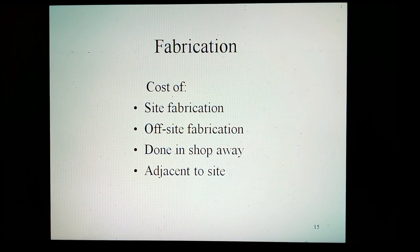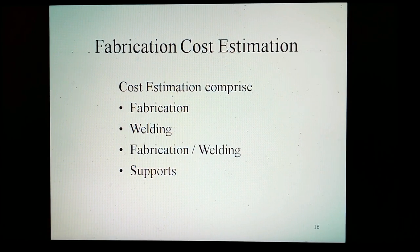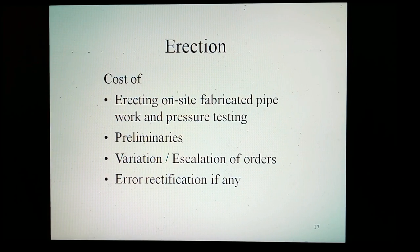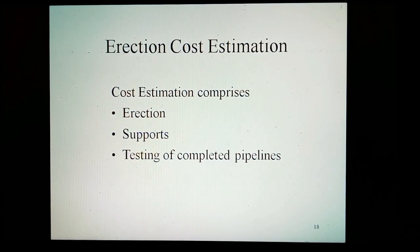Fabrication. The costs can be divided into site fabrication and off-site fabrication — done in a shop away from or adjacent to the site. Fabrication cost estimation comprises the following components: fabrication, beveling, and supports. Erection covers the cost of erecting on-site fabricated pipe work and pressure testing. This includes preliminaries, variation and escalation of orders, and error rectification if any. The contents of erection cost estimation comprise: erection, supports, and testing of the completed pipeline.